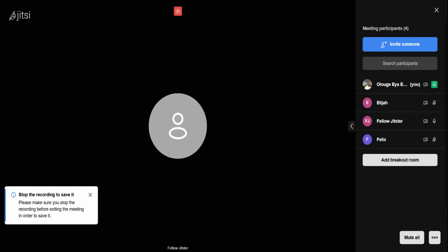Take for example, recruitment and collection of materials. If you see an arrow pointing to it, look where the arrow is coming from. Then when you double click on this task, recruitment and collection of materials, go under the predecessor tab and select this one as its predecessor.